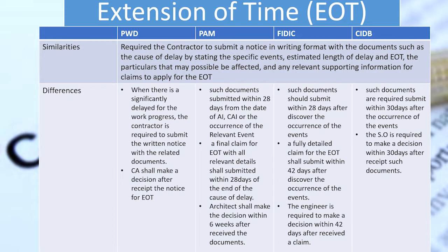In CIDB, such documents are required to be submitted within 30 days after the occurrence of the event, and the SO is required to make a decision within 30 days after receiving such documents from the contractor.